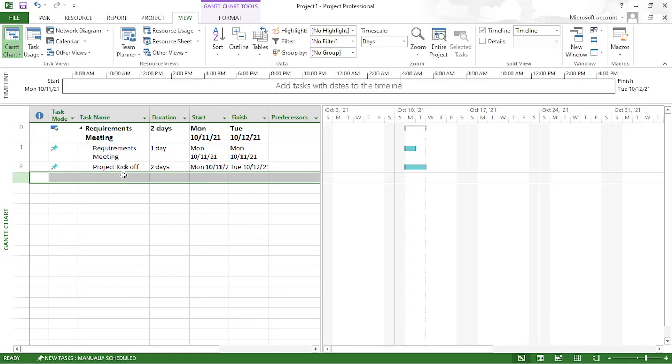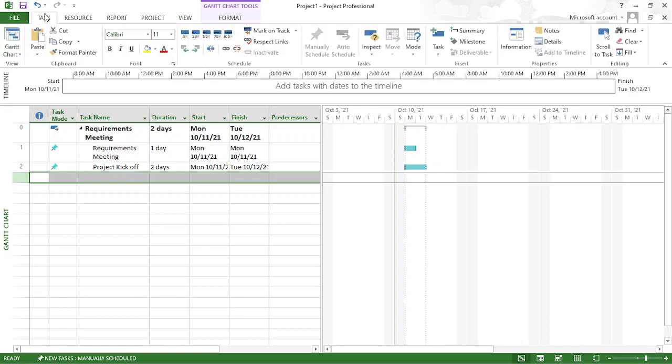Likewise, in the project, you have different milestones. You have to create different tasks, and milestones are available. I'll show you how to create a milestone now, because milestones are very important. Those are the important, critical dates that you have to find. For that, I'm going to the task tab. Under insert, I can find the milestone. Now I'm clicking milestone. My milestone is approval.